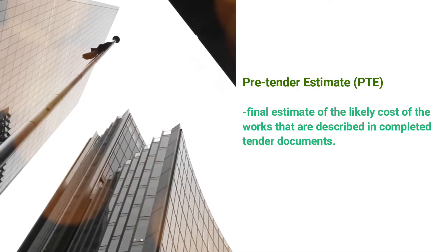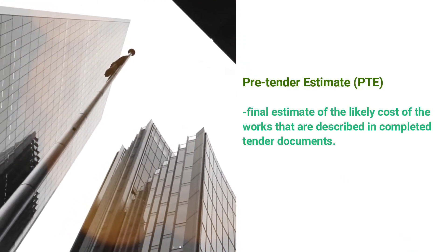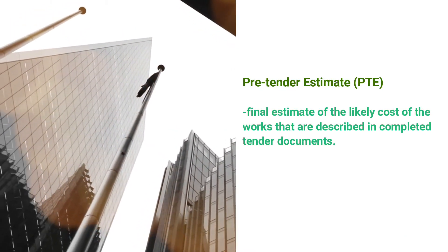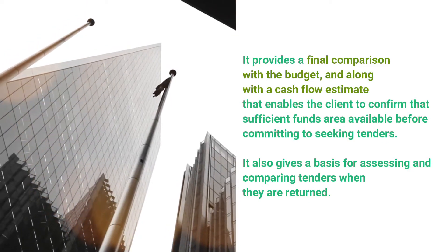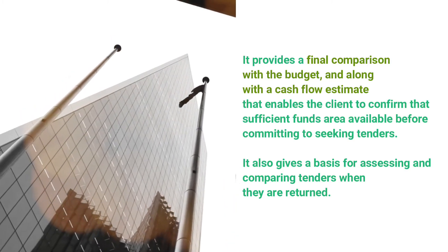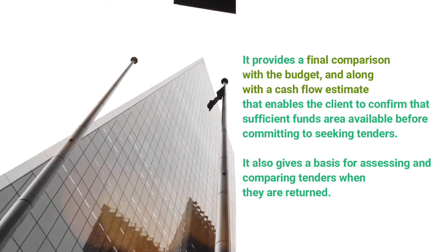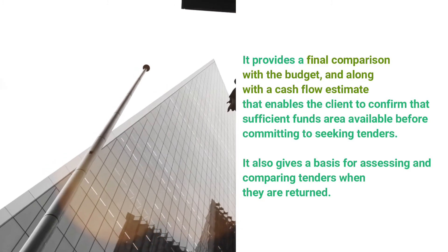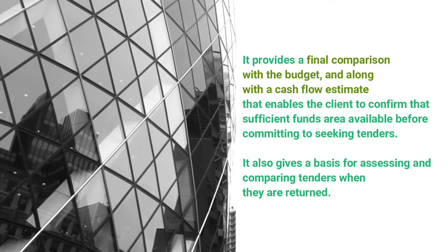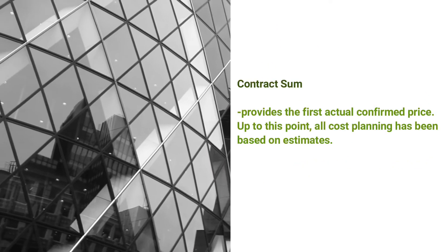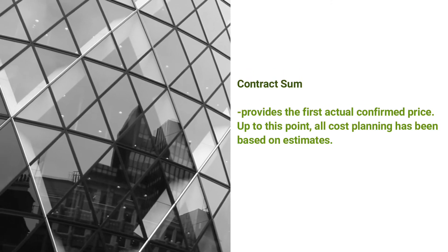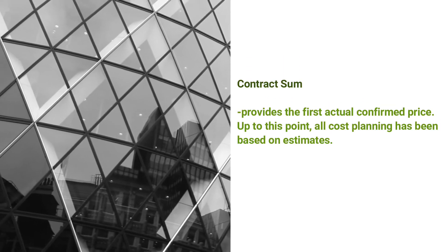The pre-tender estimate, or PTE, is the final estimate of the likely cost of the works described in completed tender documents. It provides a final comparison with the budget and, along with a cash flow estimate, enables the client to confirm that sufficient funds are available before committing to seeking tenders. It also gives a basis for assessing and comparing tenders when they are returned. The contract sum provides the first actual confirmed price; up to this point all cost planning has been based on estimates.